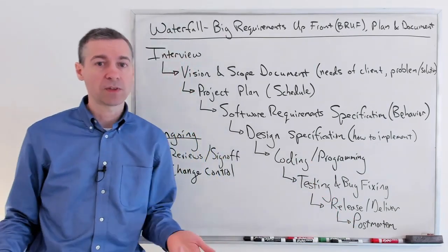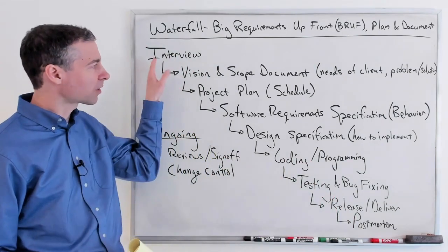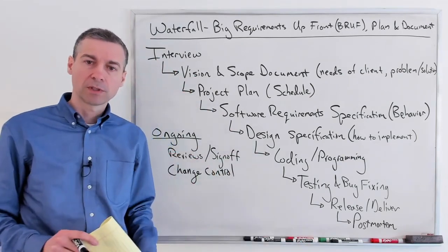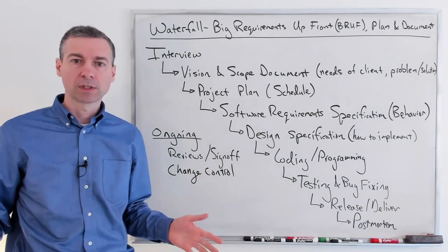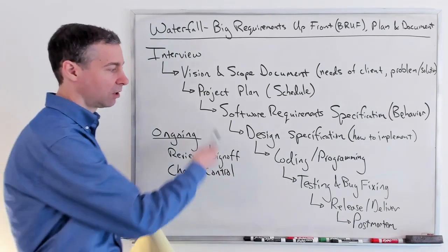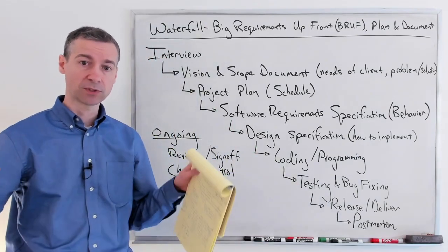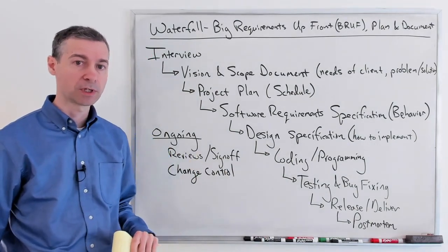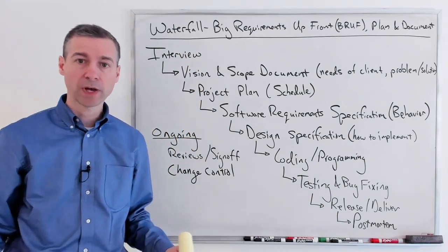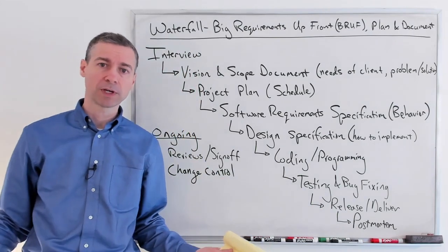One way certainly to think about Scrum is it's like you've kind of almost taken this process and scrunched it up into 1 to 4 week little projects, one after the other, but it's almost the same thing. It's just that you fix things to a certain time period, and at the end of those time periods, you get back with the customer, you reevaluate things, you keep trying to run retrospectives and make the team better.